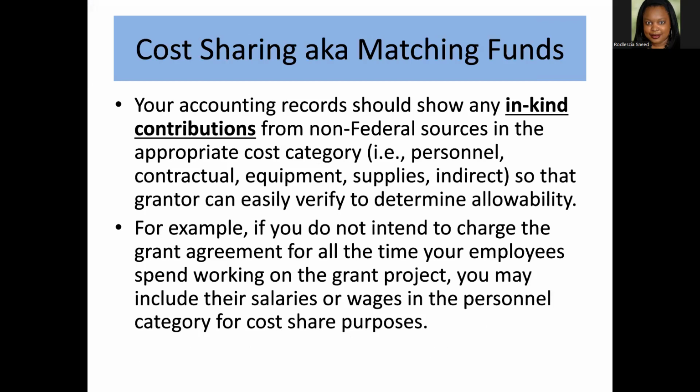You can't typically use other federal grants, and you've got to make sure that you're not over committing in-kind matches, because one of the things that we had to do when the health department was the provider of substance abuse services in Genesee County was we had to audit contractors that had federal dollar grants for substance abuse work.